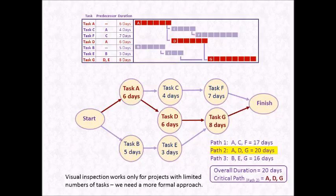Furthermore, through a visual inspection, we can tell that the duration of path 2 — that's tasks A, D, and G — is the longest at 20 days, and thus forms what we call the critical path. As tasks A, D, and G are now the critical path, it tells us that any delays on any of these tasks will delay the overall duration of the project on a one-to-one basis. We can also see that some slack exists in the other two paths. For example, on path 3 — that's tasks B, E, and G — it has a duration of only 16 days. This means that there is four days of slack existing in this path. Tasks B and E can be delayed for a few days or experience schedule slippages without affecting the overall duration of the project.